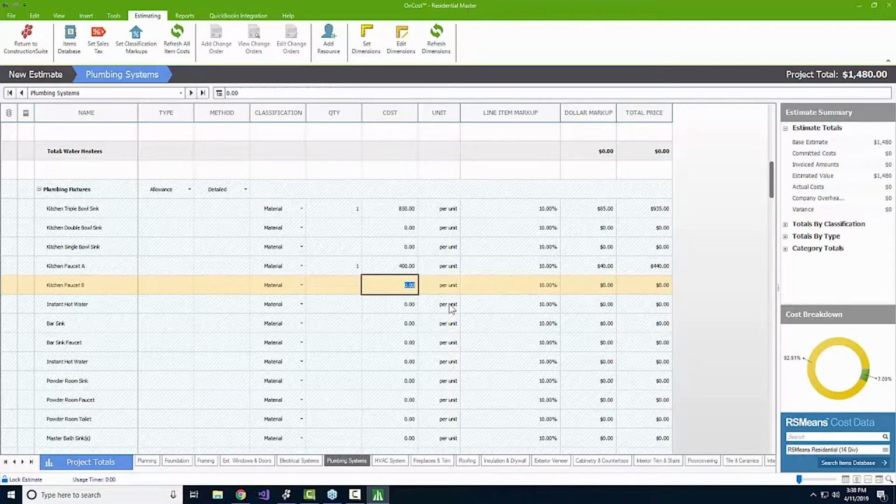But those companies who are going in there and fudging the numbers, those are the ones who are now out of business, because those first couple of jobs cost them a little bit more money, but they didn't update their estimates accordingly. So then the next few jobs that they tried to build to make up for that loss lost them even more. And then the other ones that they were building to try to make up for the loss on the second round lost them even more. And now they're not in business anymore. And that makes up about 50% of new construction companies that go out of business in that first year. That's part of the reason why.